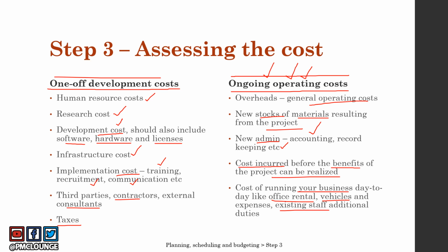Now, another thing to consider here before we close this slide is the fact that the earlier on in the project you do your estimates of the cost, the more likely it is that these will only be best guesses, right? You can only guess about costs like these. You cannot come up with a fixed figure, a final figure, right? So for this reason, it is essential to allow a significant contingency as well.